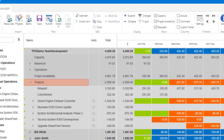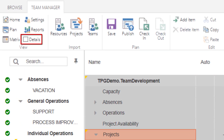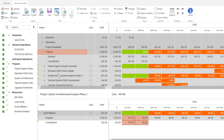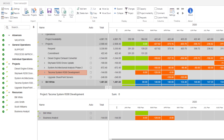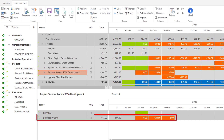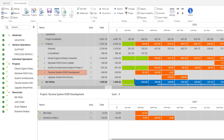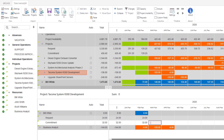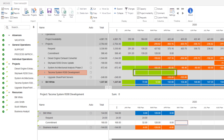We can also see whom the project is requesting or using by clicking the Details checkbox, which will split the view horizontally and show us the resources requested and committed information for the selected project. From the generic resource Business Analyst, we can see that we have 144 requested hours over a three-month period. We can also see that Bill White is available, so we will go ahead and assign him these hours. We can use copy and paste icons to do this, or manually when required. After this operation, the KOMA project is now set in green — we've managed to meet its resource requirements.